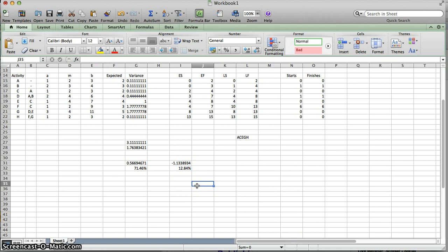because remember we told you that 15, so if we say our project completion is 15, all we're saying is that we are 50% sure. We have reached the halfway mark. We've reached the majority. If you want to be assured that you can do it, then you need to go above the 15. As we talked about here, a week extra, so 16 weeks, we're 71% sure.